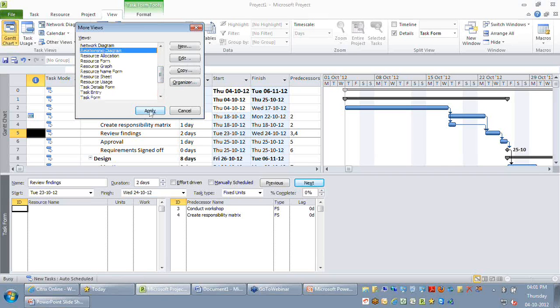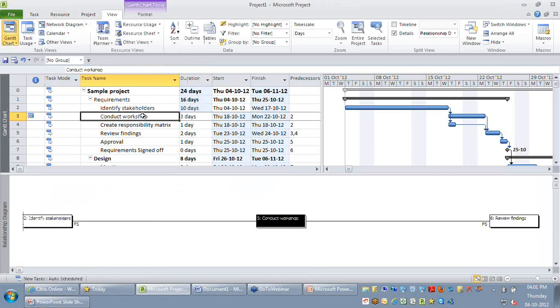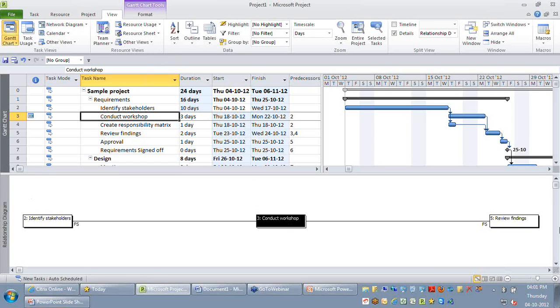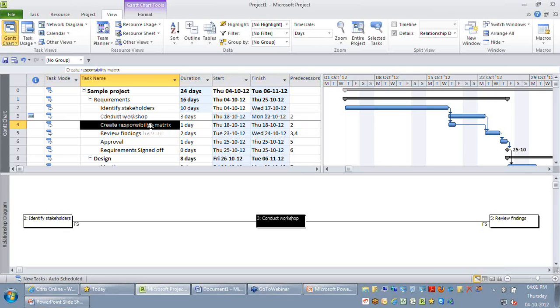So the relationship diagram is more like a subset of your network diagram, but the only focus is it gives you only the immediate predecessor and the immediate successor of the task what you're selecting on the Gantt chart. So I have selected conduct workshop. It gives me only the identify stakeholders, its predecessor and the successor review findings.